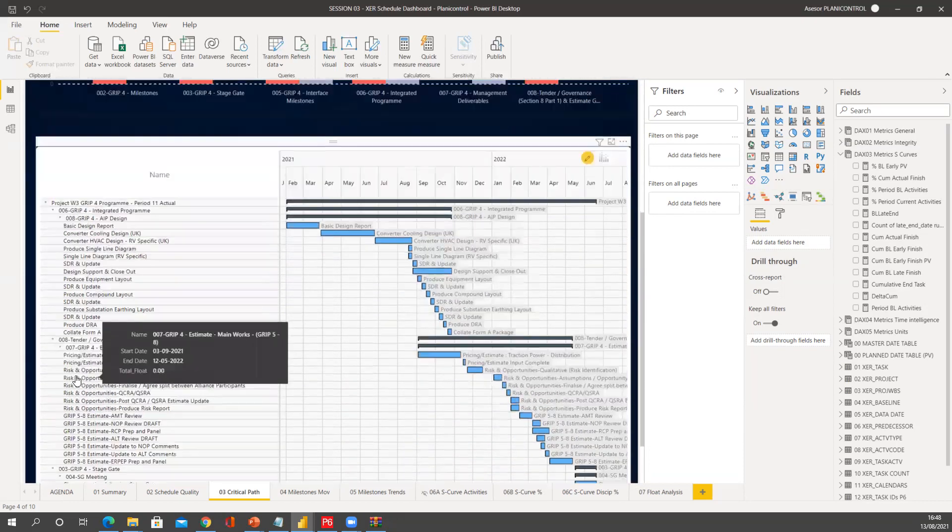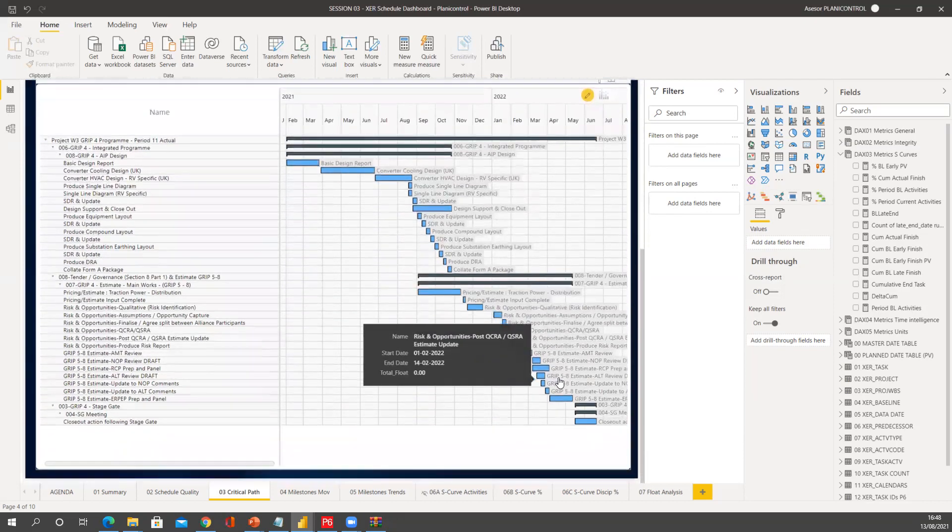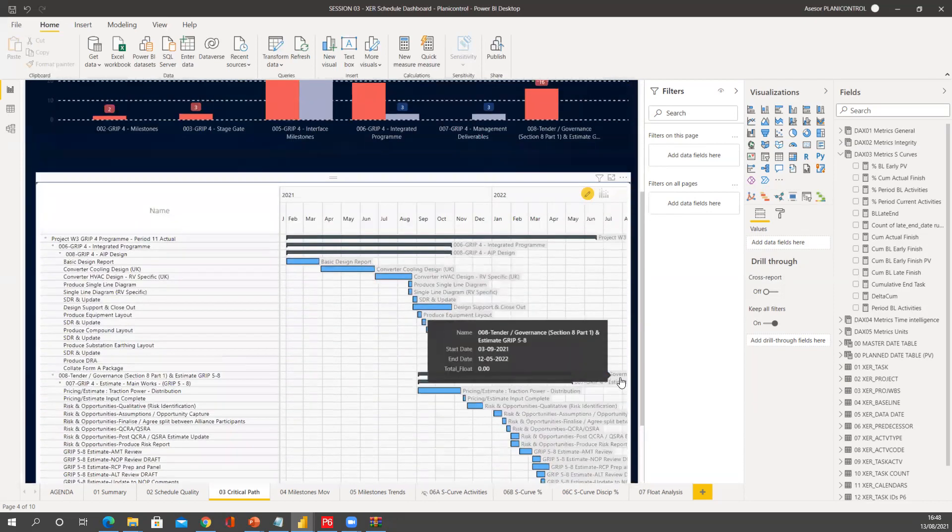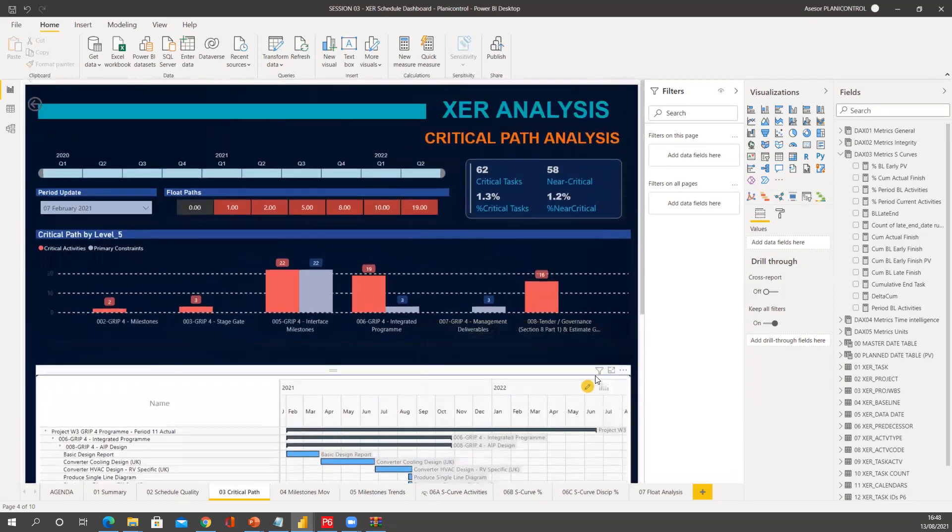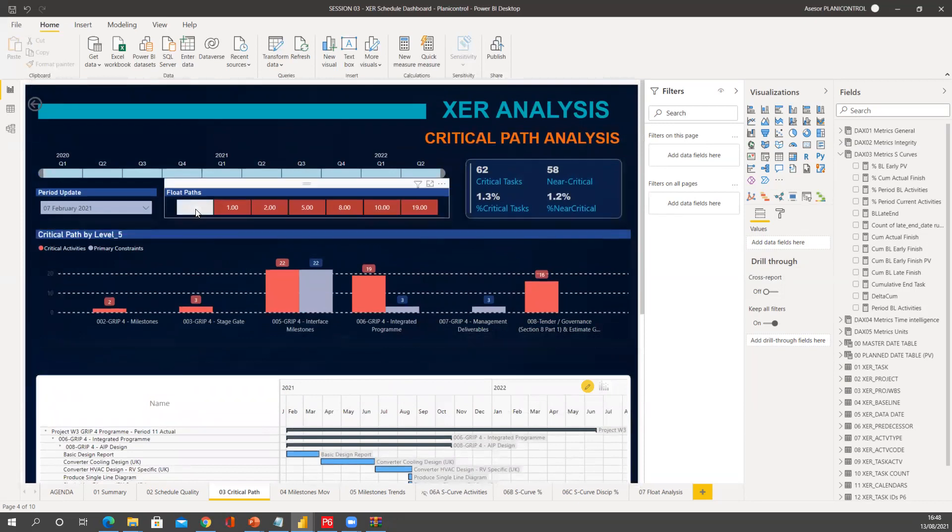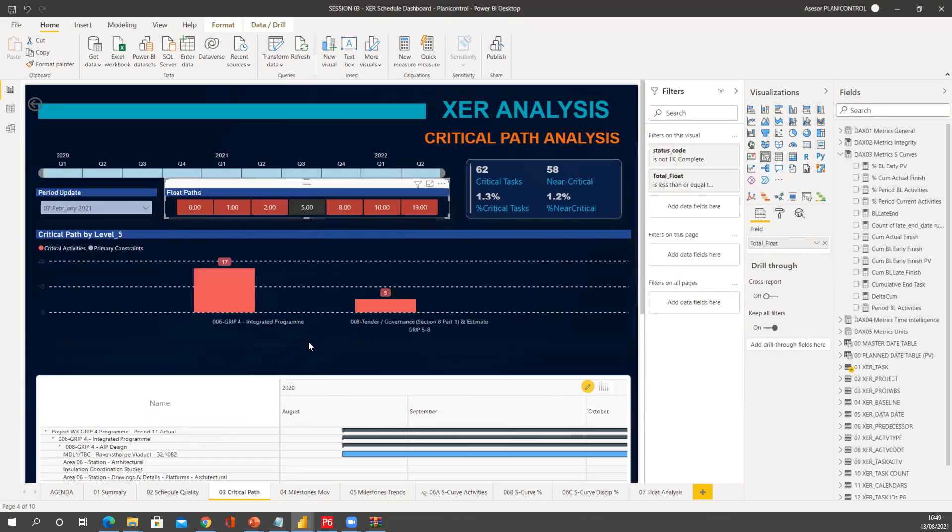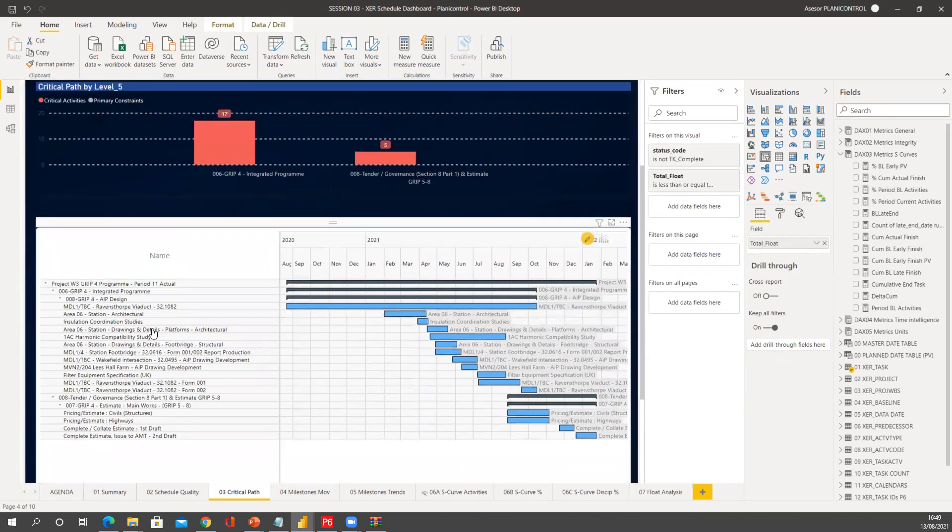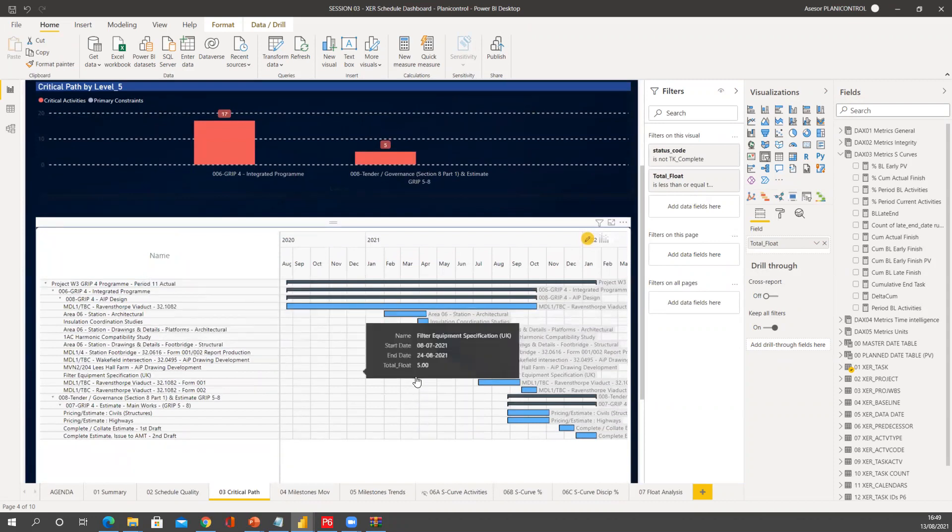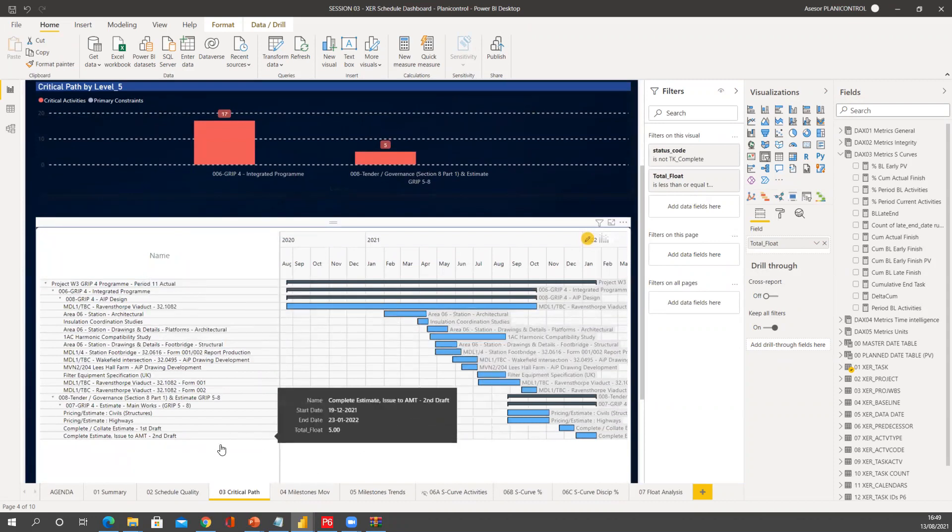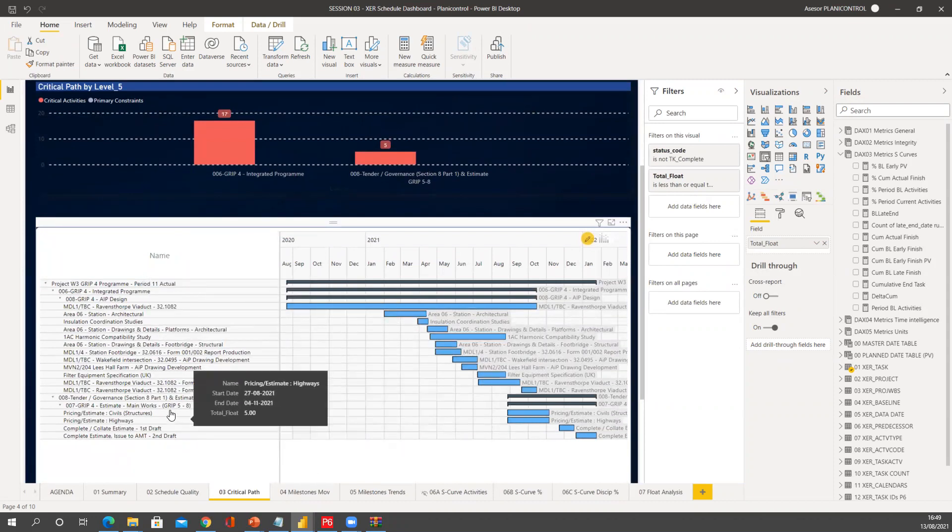And then that's only when I want to see that most critical path. But what happens if I want to see what is coming next? I go to five day float, and I'm going to have this route that I may want to start taking a look at in the next period submission.